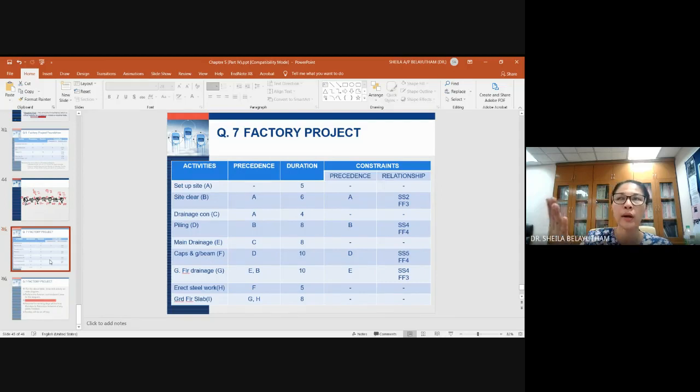So you will need to understand dates. One working day starts from morning until evening. So if your early start is 1st May, for example, with one working day, your finish will still be 1st May, but in the evening. That one we'll conduct later.